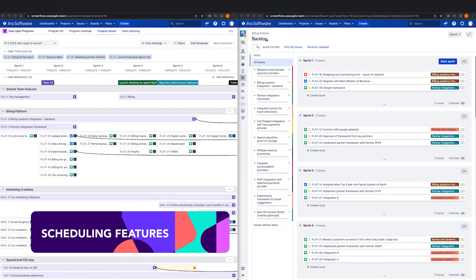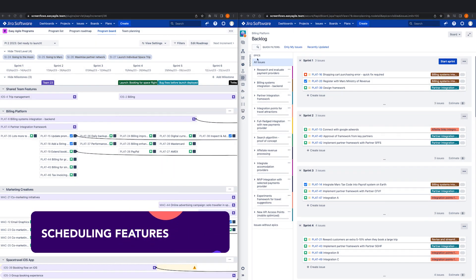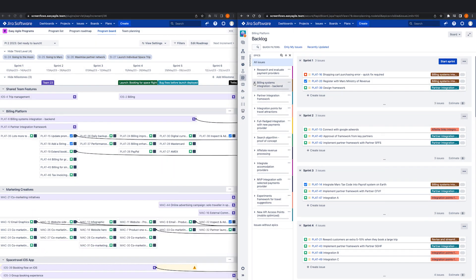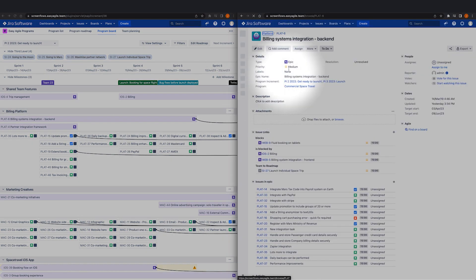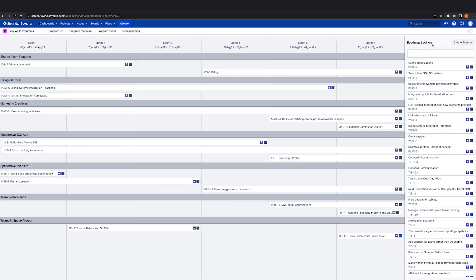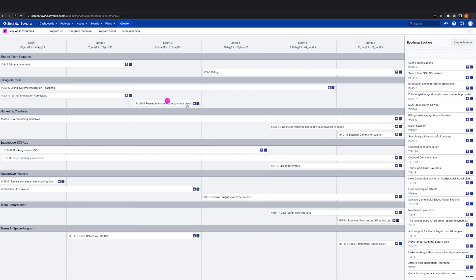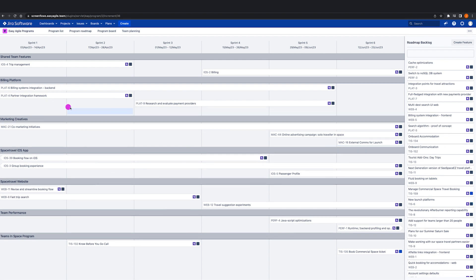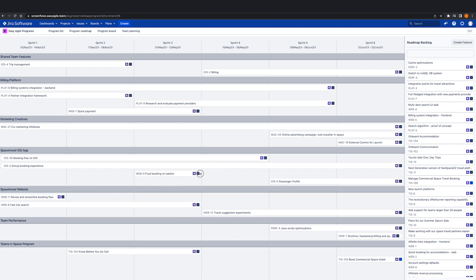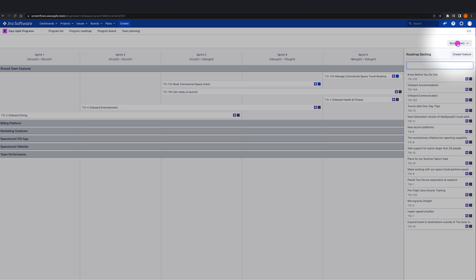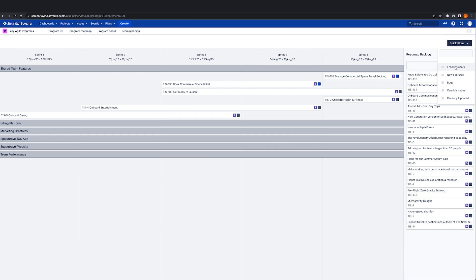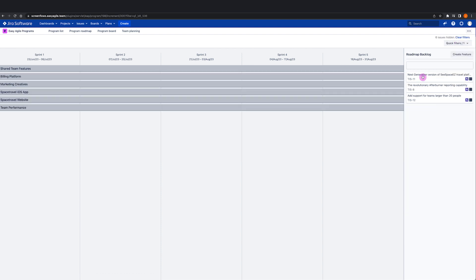In preparation for planning, product managers together with stakeholders are recommended to create features in JIRA that they'd like the teams to work on. In Easy Agile Programs, these features are commonly represented by native JIRA epics, but we offer the flexibility to use the issue type that works for you in your configuration. To schedule features into the PI, click the Edit Roadmap button. Depending on how your program is configured, the epics in this backlog will be pulled from a single JIRA board or from the team boards added to your program. If you have set up the program using a dedicated roadmap board and would like to narrow the options from the backlog to bring focus to your pre-planning, you can apply a quick filter to the backlog.